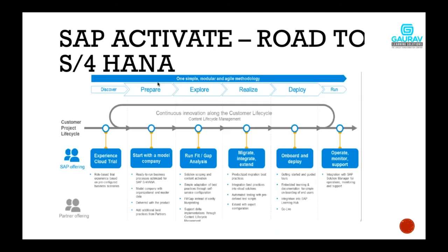Because as I told you earlier, in SAP SF methodology, we were not showing any system to the client in the blueprinting phase. The blueprinting phase was completely theoretical. We were just creating the PDFs or Word documents and submitting them to the customers, and customers were seeing the screens only during the realization phase.